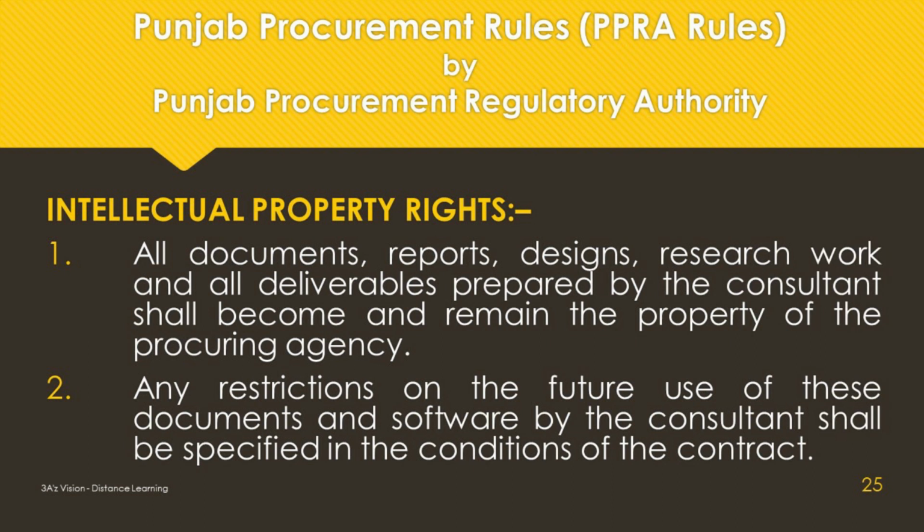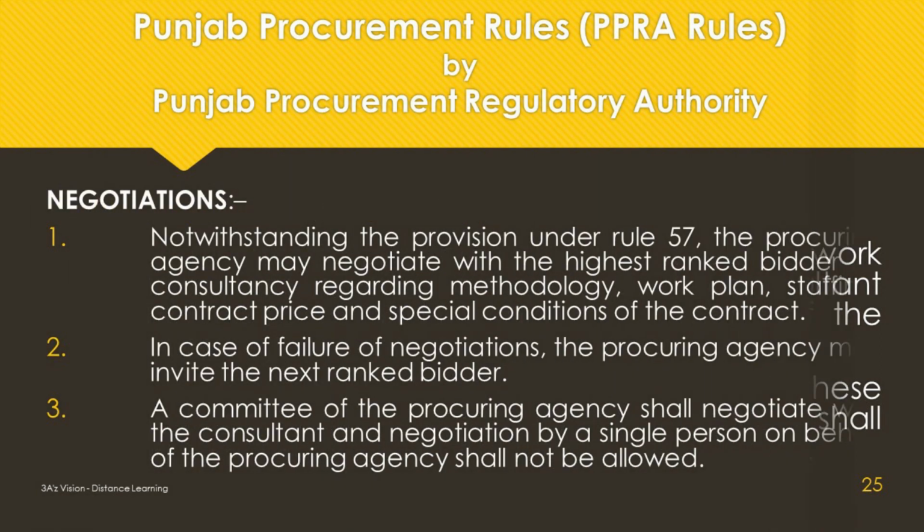Intellectual property rights. All documents, reports, designs, research work, and all deliverables prepared by the consultant shall become and remain the property of the procuring agency. Any restrictions on the future use of these documents and software by the consultant shall be specified in the conditions of the contract.